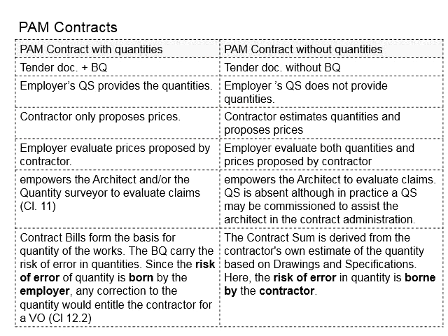Based on several tenders submitted by different contractors, the employer will only need to pay attention to the price since the quantities have already been standardized. This allows the employer to make more direct comparison among the prices given by the contractors. Although we know that PAM contract is fundamentally a lump sum project, that means whichever price proposed by the contractor will be a fixed price as agreed between the contractor and the employer, which the contractor can deliver the work based on the contract sum.